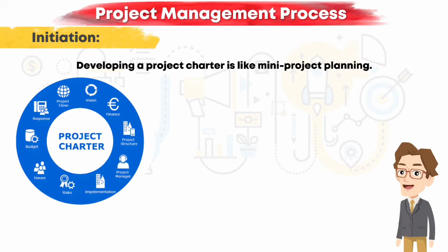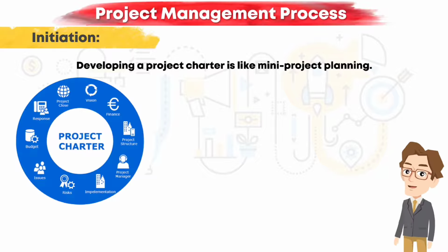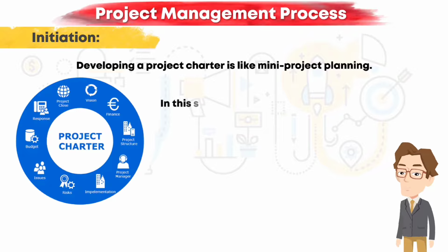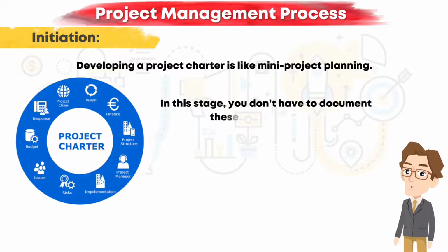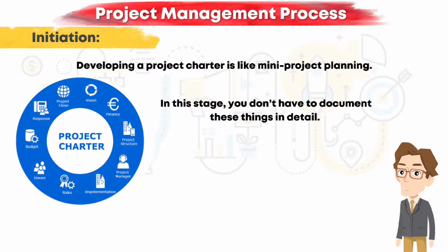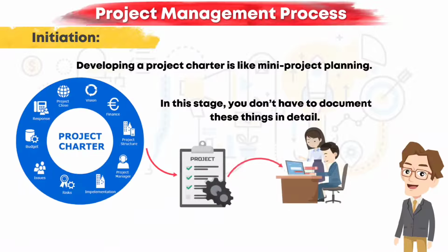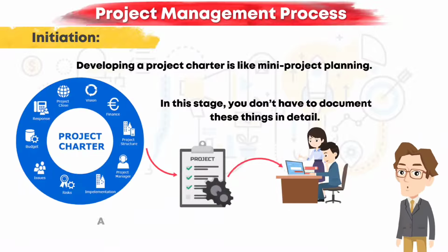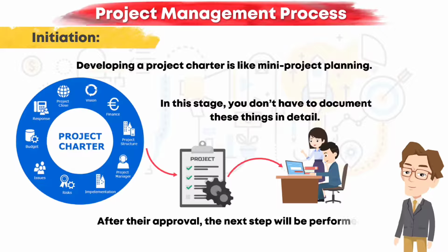It includes deciding and noting down project scope and objectives, a rough idea for the cost and time, key stakeholders, and opportunities. In this stage, you don't have to document these things in detail. After developing the charter, that is sent for approval to the higher authority. After their approval, the next step will be performed.